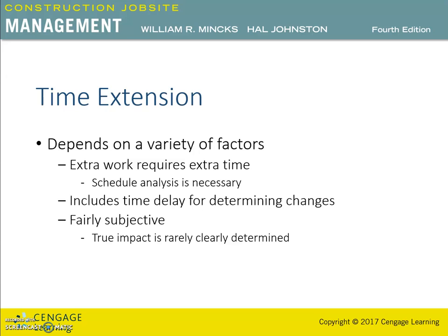Some time extensions are due to delays in the project caused by outside influences. Most contracts allow extension of contract time for delays due to labor disputes, fire, unusual delay in deliveries, unavoidable casualties, or other causes beyond the contractor's control.